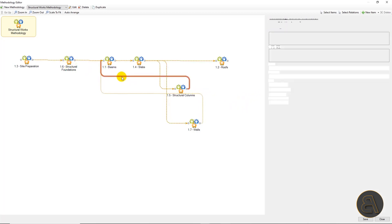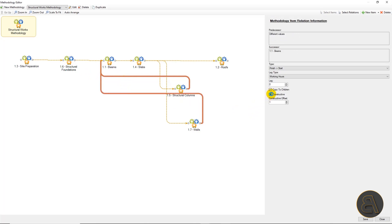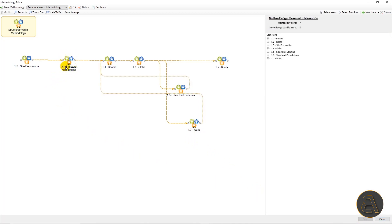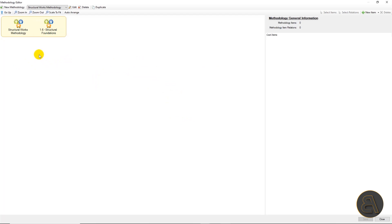Let me explain what these backward relations are. If you remember, we enabled the level zones to be constructive so we can make these backward relations. These backward relations have the constructive option checked, and what that means is that after we create walls and columns on the current level, we want to create beams on one level above before we move on to the slab. The construction offset tells us how many levels above we want to offset these activities — in this case, only one level above. Now if we want a more detailed schedule with activities for concrete works such as formwork, reinforcement, concrete pouring, and concrete finishing, we can define a second level of methodology for each methodology item.